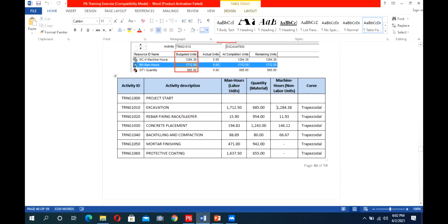For man-hours, every company has its standard that to do the excavation, we need so many man-hours for 1 cubic meter or 1 unit. We will have our BOQ with us, that for this activity, total excavation is 100 cubic meter. And what is the company's unit? It's 0.941 cubic meter. So we will have 90 man-hours for this activity.